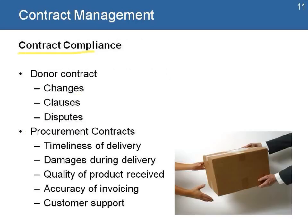Contract compliance from the donor contract involves looking at changes, clauses, and disputes. From the procurement contract with vendors, we look at timeliness of delivery, damages during delivery, quality of the product received, accuracy on invoicing, and any kind of customer support provided by the vendor.